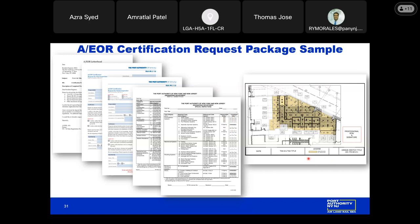And if I could just draw your attention to the special inspections checklist. When it comes to the elevator escalator, you can see on line 26 here, it's New York City Building Code Chapter 30, Appendix K, like was mentioned during the design presentation. We will see a date populated with the responsible special inspection agency. You will also see, if this is a partial inspection, which is line number 24, a date populated as well. And that is the engineer of record's partial inspection.